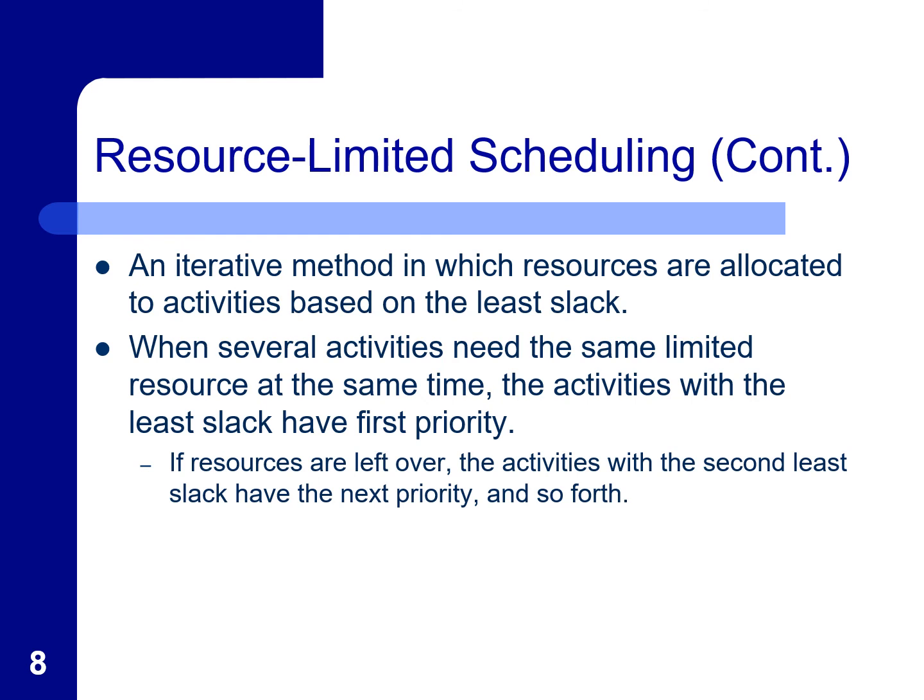The least lag will have the first priority. If you are booking a venue and booking a caterer, which one is critical? Definitely booking a venue, because for the venue we only have several choices, but for caterers we have more choices than for the venue, so you have to focus on the venue first. Okay,